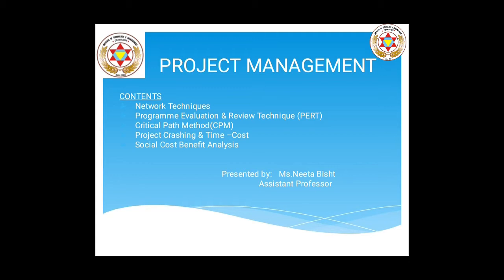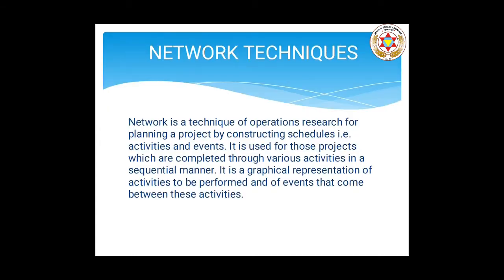Let's start from the Network Techniques. A network is a technique of operational research for planning a project by constructing schedules of activities and events. It is used for projects which are completed through various activities in a sequential manner. It is a graphical representation of activities to be performed and events that come between these activities. There are two major techniques of network analysis widely used for planning large and complex projects: Program Evaluation and Review Technique and Critical Path Analysis method.